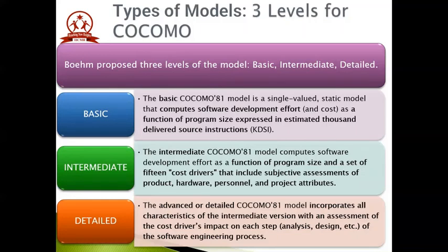Intermediate COCOMO takes cost drivers into account. This model computes software development effort as a function of program size and a set of 15 cost drivers that includes subjective assessment of the product, the hardware, the personnel, that is the people involved in software development, and the project attributes.